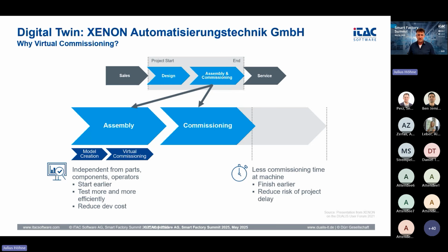In that case, it was the same way. We didn't have the possibility to buy the parts, or our customer didn't get the parts, and so it wasn't possible to have an on-site commissioning in a traditional way. So it was not feasible under these conditions, and there was the problem of a significant delay of that project. That's why we did some virtual commissioning, because then we were able to prepare everything to start the machine once the physical components were delivered and the system was assembled. In that moment, we were able to switch on the machine and nearly everything was working fine.